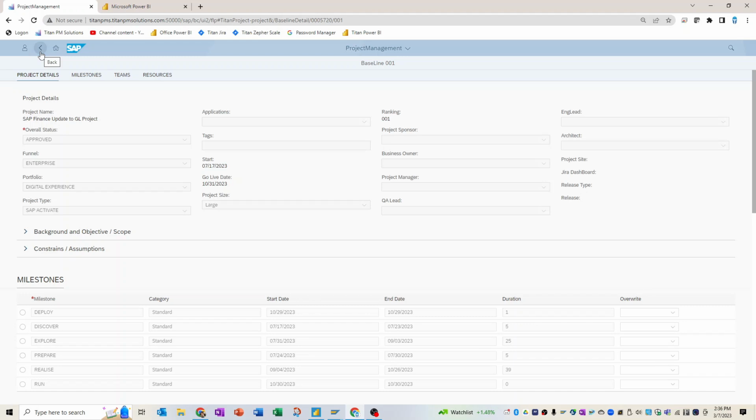This year we did pretty good at our estimating process, or maybe we really tend to be way too conservative, and we can fit more in, or we are way too aggressive and it puts some challenges up. So the next year, the next project that goes in, we really can adjust the estimates that our project sizes are and really do a better job at nailing what can be done when.